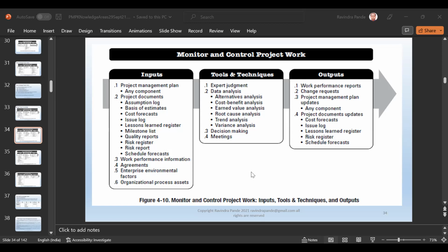The project integration management plan is kind of one document, but it encompasses all these 9 different project management processes, starting with project scope management. So what's the overall scope? These are the core objectives. This is where we kept our requirement list and so on and so forth. In project cost management, we might consider what type of cost we are talking about, what the management reserve is, what the total cost the project couldn't exceed is, and the tracking of it, the review processes and all those things. So all these management plans include all such details.